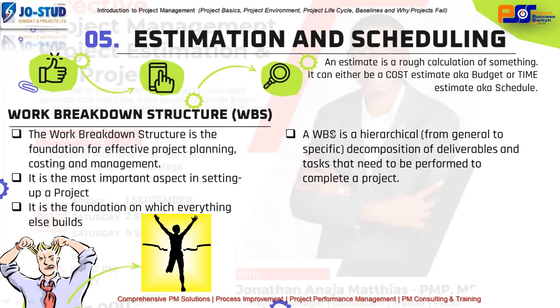If you don't understand the work breakdown structure, you will not be able to accurately estimate. So let's note it well that before you start any estimate, make sure you have a WBS, a work breakdown structure. I said something yesterday in passing in our class. I said if it's not in the WBS, if you are not able to break it down, that means it's not part of your work. Do not waste resources on anything that is not in your WBS.